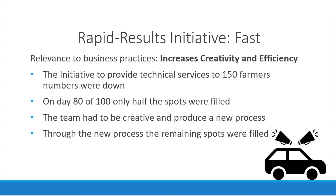How does being fast relate to today's business practices? If a business cannot receive results at a fast rate, they will become obsolete and fall behind the curve. The article focused on creative and effective solutions. One initiative — providing technical support to 150 farmers in a drought area — was struggling. By day 80, only half the slots were filled and the team was becoming disheartened. However, a quick and creative new process was put in motion: team members jumped into their cars and trucks, drove out to villages, and from loudspeakers announced that technical support would be provided to farmers who signed up. In no time, all remaining spots were filled, allowing the initiative to succeed.